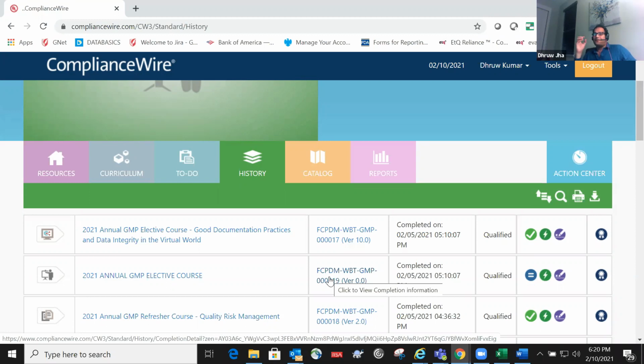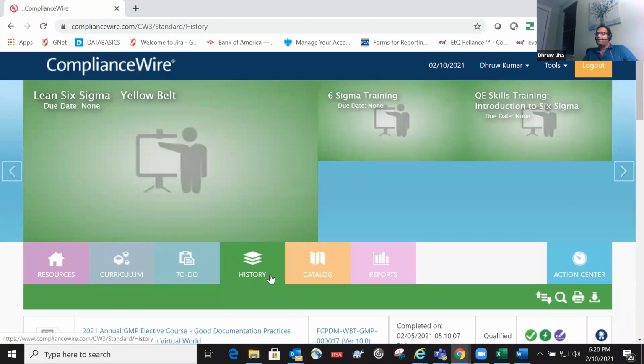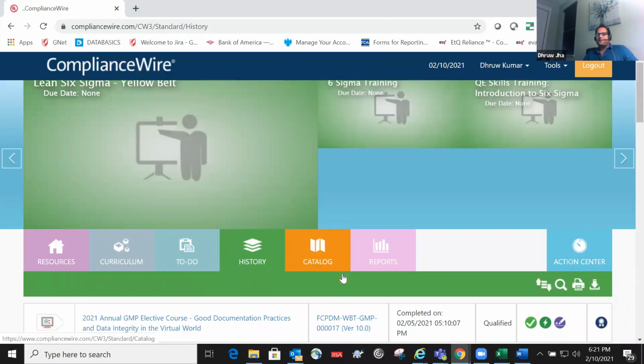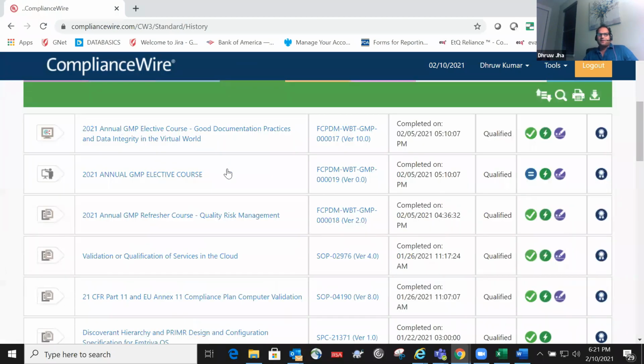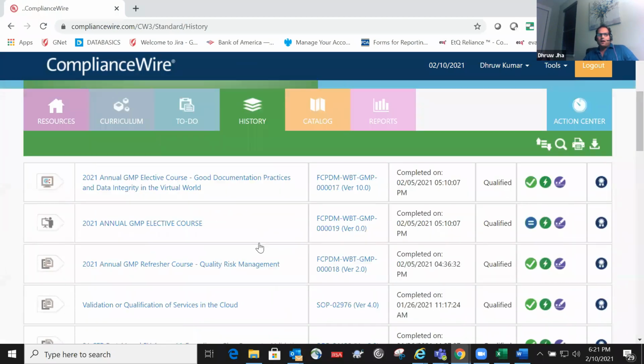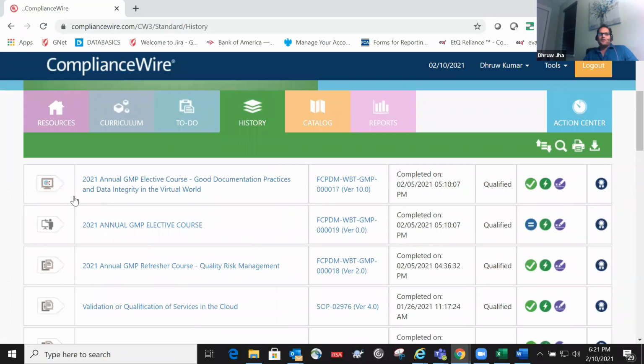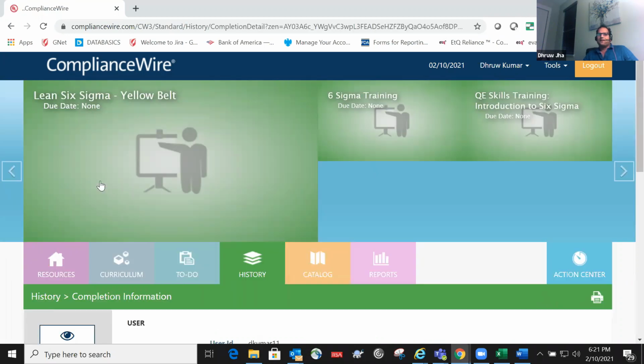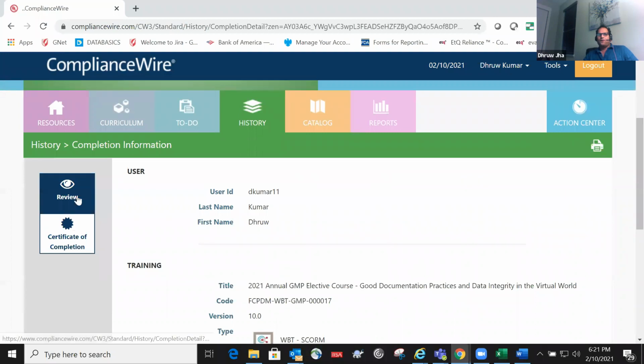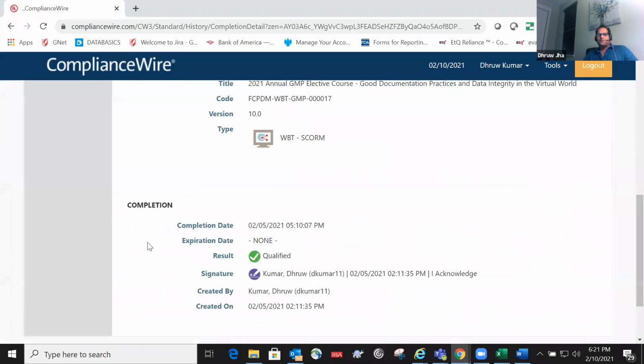Focus on the system. How are you going to defend that? I have validated this system. You're going to put it in your resume. So stay focused on that. You're going to pick a few modules. Each module takes 3 to 4 months, 5 months, to validate, because there are a lot of functionalities in this. For example, you see this right now, I have the option, if I click here, I can retake this class again. So for example, I see review, completion, and all these.